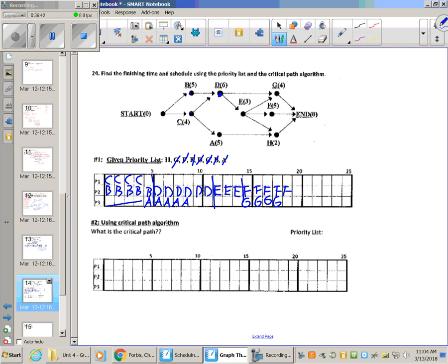Okay. He was idle up until he started working on that. Then he was idle when he got to G. All right, as long as A's past its prereq C, that's good. And I can be able to fit it kind of previously a little bit there. And now I can probably do H. It's got to be past E. It's got to be past A. So the point where it's past E and A is right here at 14, and I can squeeze that in with P1. So I've got 2 H's right here. Okay. Sweet. And this whole time right here he was idle. So it looks like that we finish again in 19 hours.